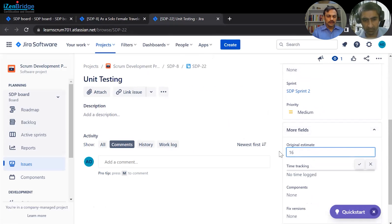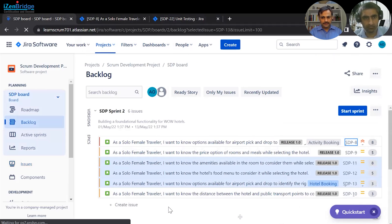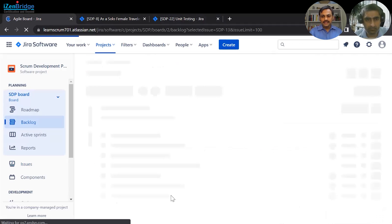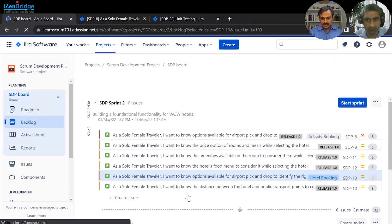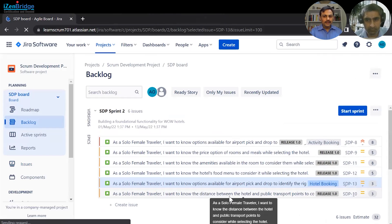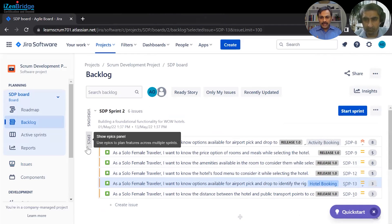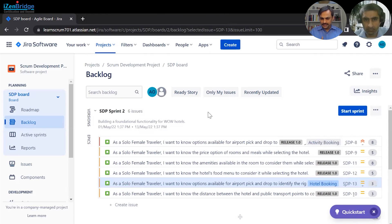Returning to the sprint backlog view, one of the items has been taken down to the subtask level, while others still have only high-level details. It depends on how you want to do your sprint planning. Some teams want to detail every user story during the sprint planning meeting itself, while others may want to add first-level details now and refine later.